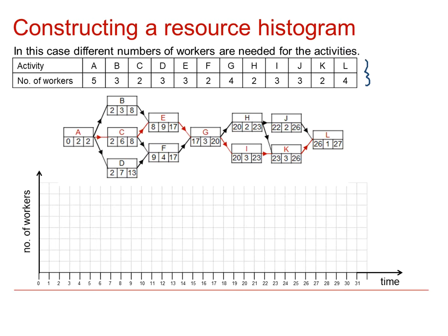The process is basically the same, however. We start off by putting in the critical path activities, but this time the height of the rectangles, instead of just being 1 from beginning to end, will go up and down depending on the number of workers. So for example, A requires 5 workers, so that will be a rectangle of width 2 and height 5. So it comes up to time 2 and we'll have height 5. So A starts off by being in this position here.